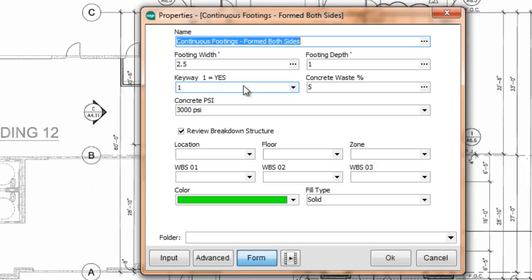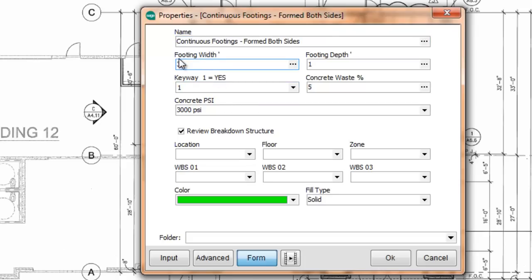Now I can change these values. So if my footing on this place is 3 foot, I can make that change. If I would like to have 4% concrete waste instead of 5, I can make that change. So at the top, you will see the specific questions about the takeoff that we are doing.